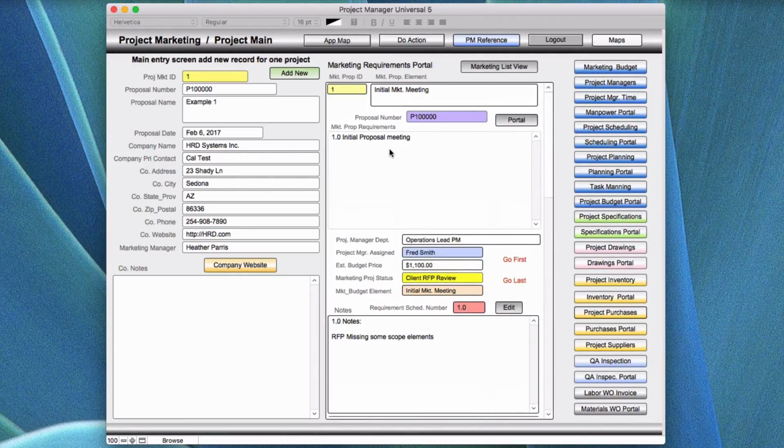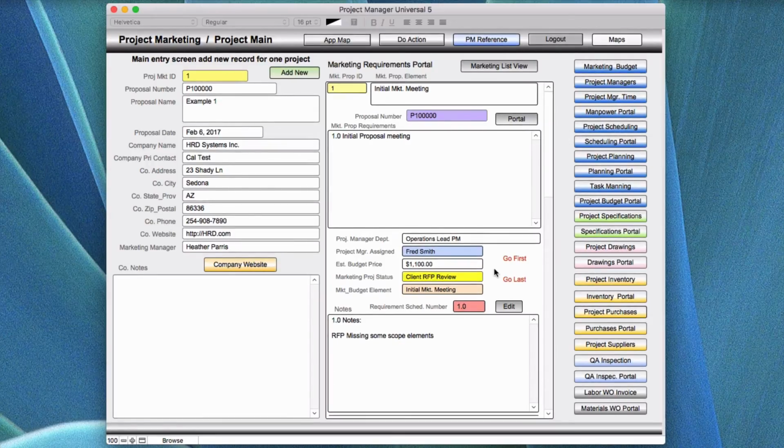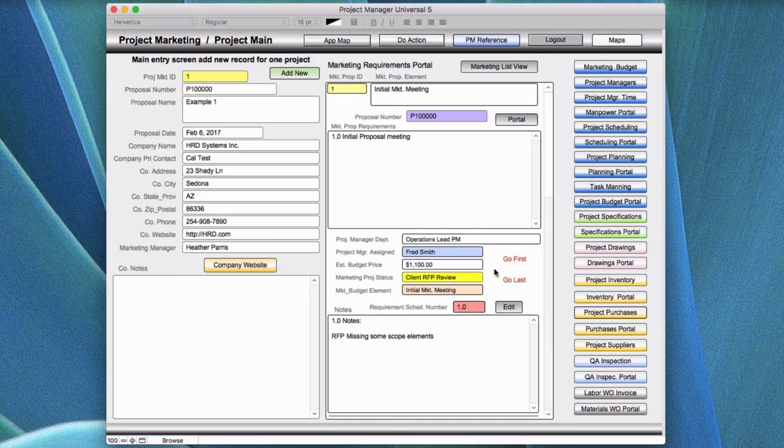The reason I'm picking survey is I have done a lot of work with Civil Engineering Group, and I can pretty well tell you every project that they did and how it worked as far as what was the estimated number as opposed to the labor number. And it has a lot to do with travel to the site where they're doing the survey, how many people are required, and what kind of equipment, and what is their equipment cost just to use it. There is a set price. For example, if you're going to use a survey device to do a survey, there may be different things that are required as far as equipment that can vary the price depending upon that. And then the topography you're working in.